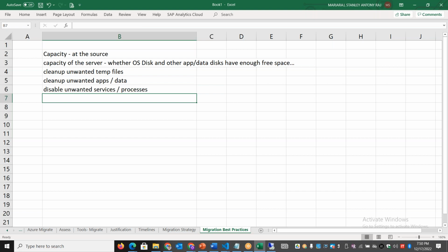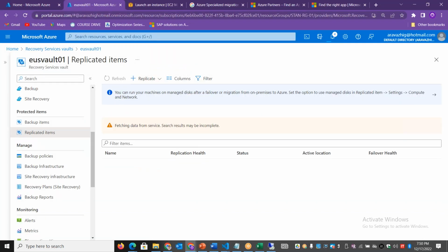If there is a particular system that is very business critical, you need to get the maintenance window and then bring down the application or database. We have to do it in a proper maintenance window. We should not do it online.